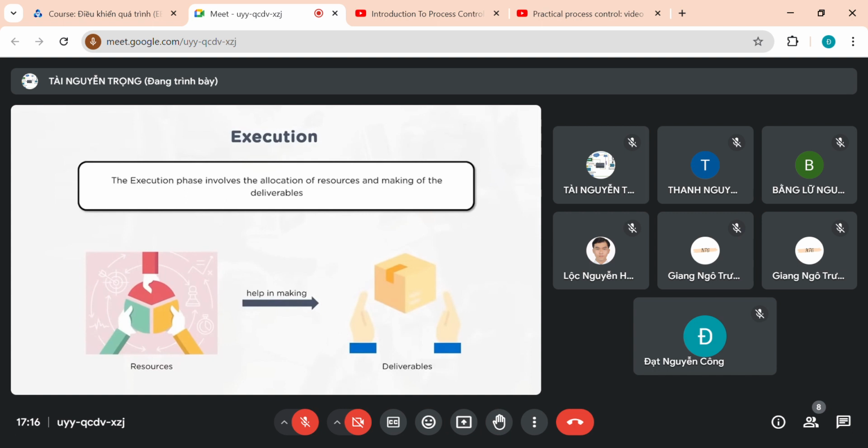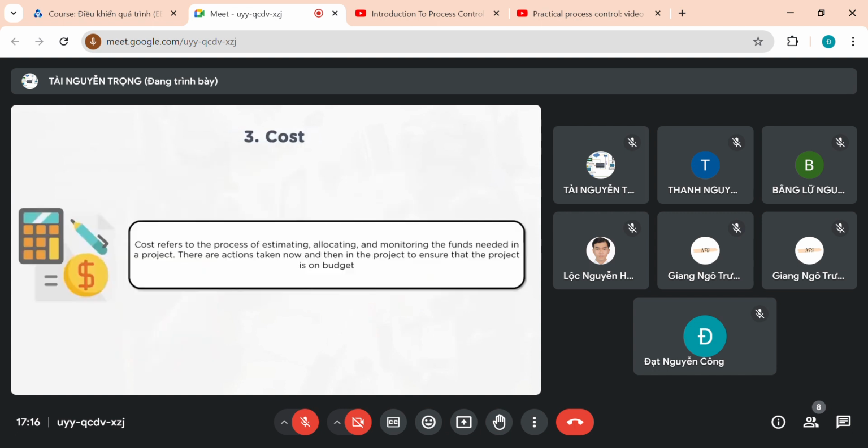Once this estimation and allocation of budget happens, that becomes a base, and any deviations from that cannot happen so easily. Deviations because of additional scope can be handled through change management, but in the ideal scenario, the cost should not escalate or come down. The organization can also set certain tolerances at the project level, considering different scenarios, like risks, or something which deviated from the deliverable. To what extent it can deviate, that tolerance will also be set from the monetary value perspective.